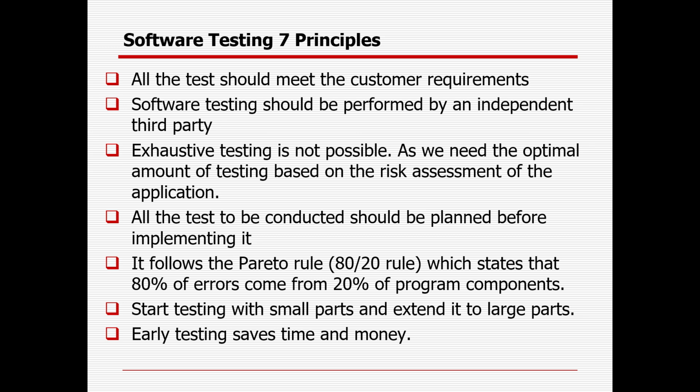And the testing team, instead of 4 months, will be getting only 2 months to complete it. So within the 2-month time frame, it is not possible to test all the stuff. So here you can prioritize the testing, and you can go with the risk-based testing approach.